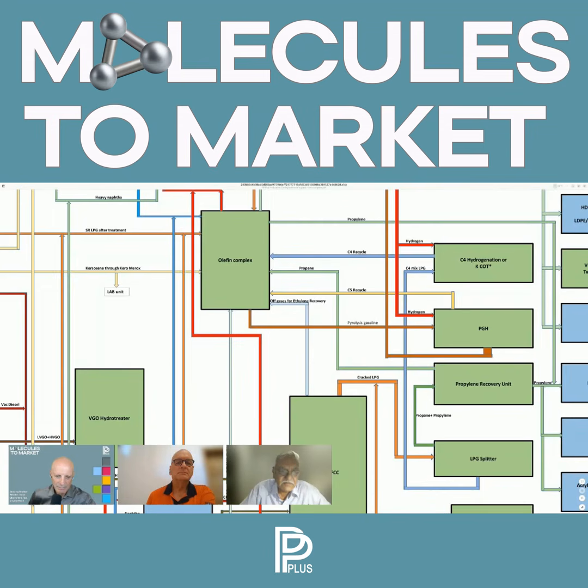If the project is principally okay and the board is convinced both with the technology, objective function, location, incentives, the order of magnitude cost estimates, and the project viability directionally, then a clearance is given that you can go ahead and now do what we call a DFR, Detailed Feasibility Report.